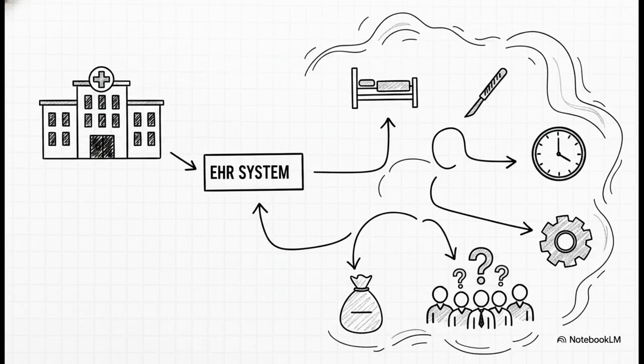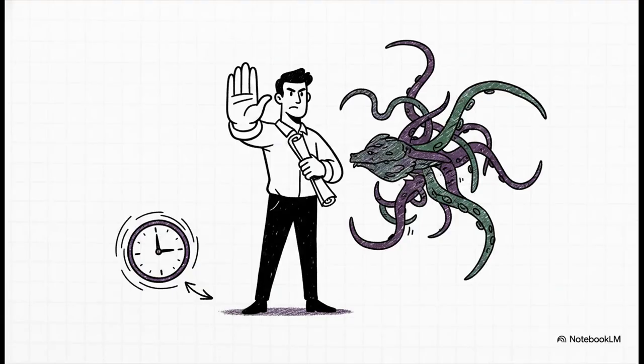For example, imagine a project starts out to implement an electronic health record, or EHR, in a standard medical clinic. But suddenly, halfway through, someone decides to add the EHR to the outpatient surgery area too. Well, the needs of those two areas are vastly different. Adding this mid-project totally inflates your timelines, drains your budget dry, and demands training and resources you simply have not allocated for. It's a total nightmare. So how do we stop it?